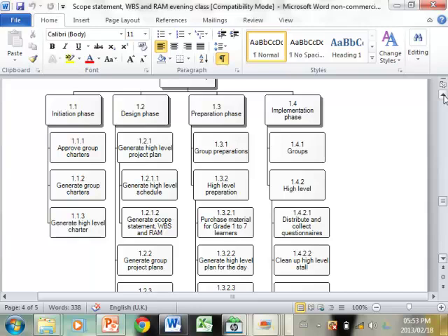The work breakdown structure only tells you what the activities are that need to be done. So there's no sequence, there's no schedule. Logically, one would think, I must do this and I must do that, and somehow you would use sequence when you're thinking about it. But strictly speaking, a work breakdown structure has no schedule information in it.